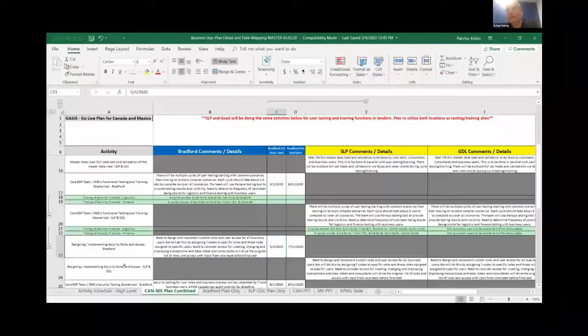I want everyone to know, right? Say by end of October or beginning, whatever we decide on, whether it's the 15th or so. They should know in a simple 3-4 slides: this is where we need to be and this is where we are, and these are the functions or business processes that need to be tested in a weekly fashion. Get it? Okay. So once that is there, anyone can make an assessment of whether we are too far behind, on track, or behind. But I want that to remain at a business process level or a function level.